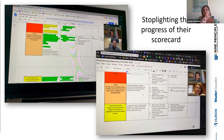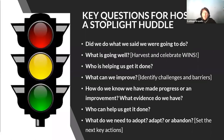Don't let yourself think that doing it virtually doesn't give you the opportunity — it's as powerful then as it is face-to-face. So what can the conversation look like when you're huddling around your stoplight? Here are some key questions: Did we do what we said we were going to do? What's going well — harvesting wins? Who's helping us get it done, or who can help? What can we improve — identifying challenges and barriers? And finally, what do we need to adopt, adapt, or abandon to set the next key actions?